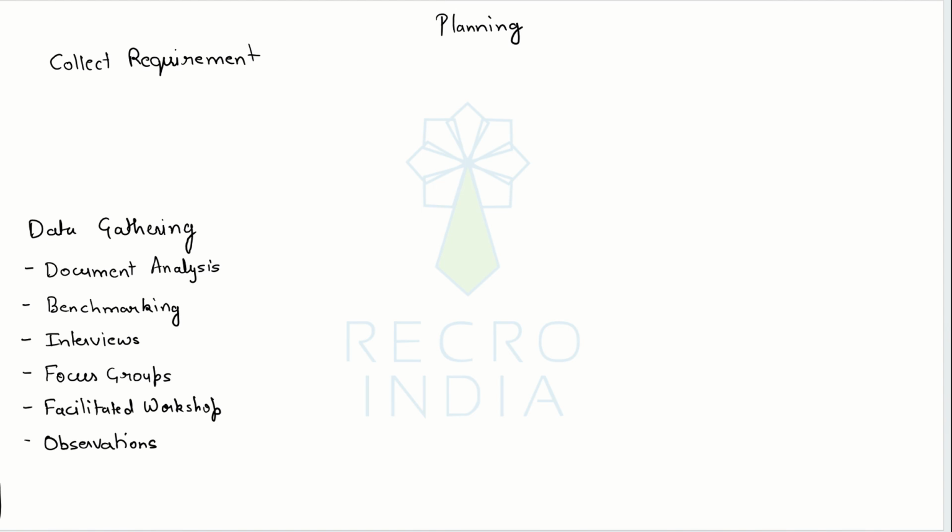So I asked one of my experts to go and sit down with them and see how they are processing the payroll with the current systems. And my experts can identify that there are certain steps which can be automated with the new system. There are certain aspects of the payroll where they are relying on a lot of manual work, which can be eased out with the help of our system. So this type of requirements can be collected through observations.